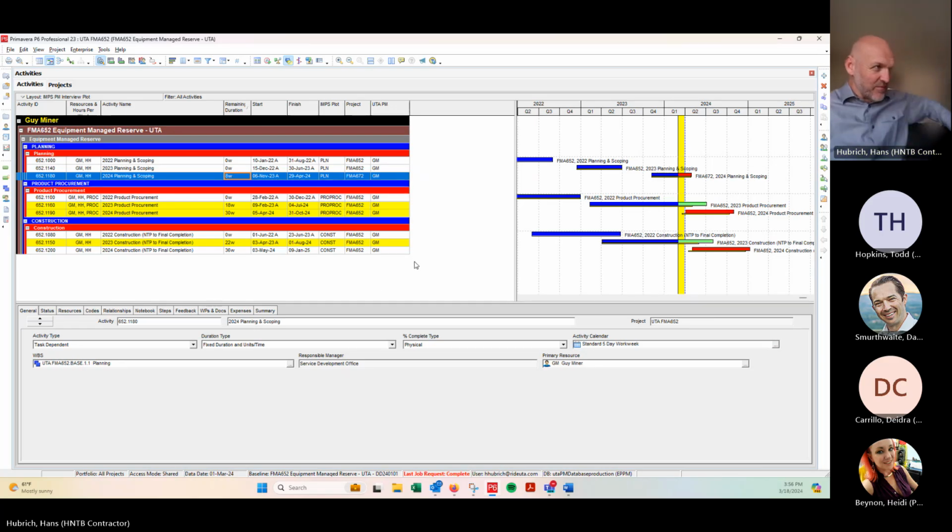In this instance, between January 1st and March 1st, I always use 4.2 weeks per month. So we've actually gone 8.4 weeks, and I just rounded from 8 to 9 weeks.